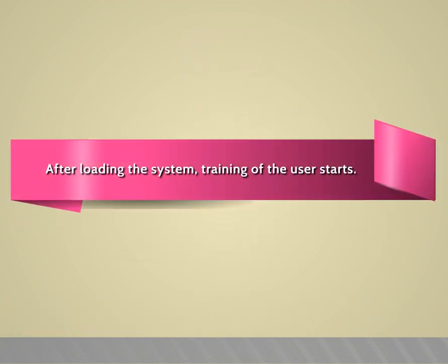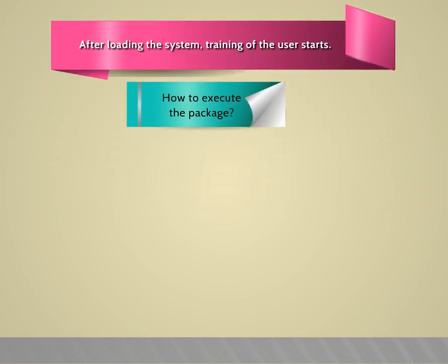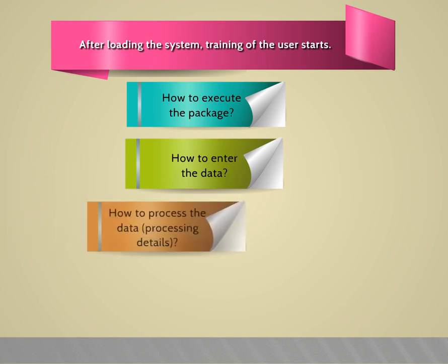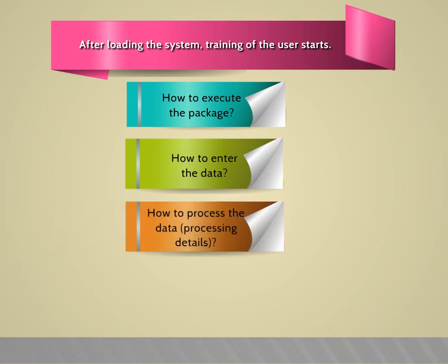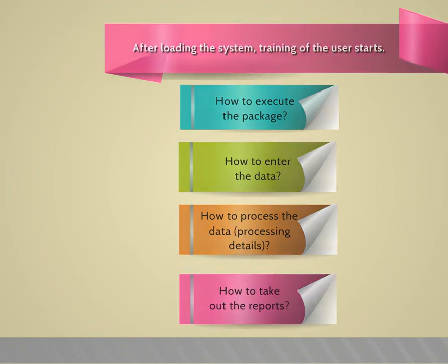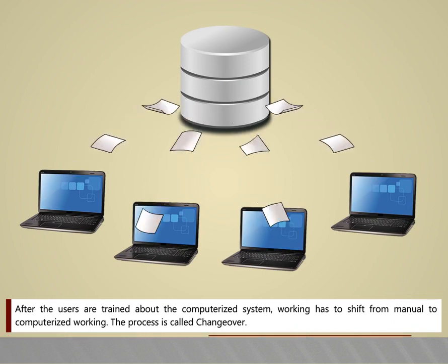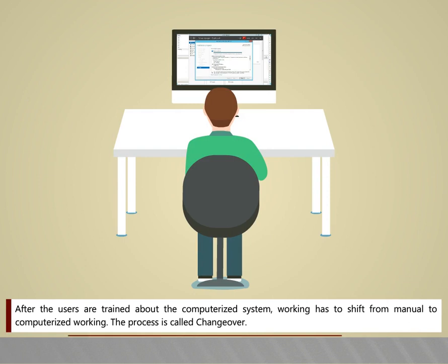After loading the system, training of the user starts: how to execute the package, how to enter the data, how to process the data, processing details, how to take out the reports. After the users are trained about the computerized system, working has to shift from manual to computerized working. The process is called changeover.